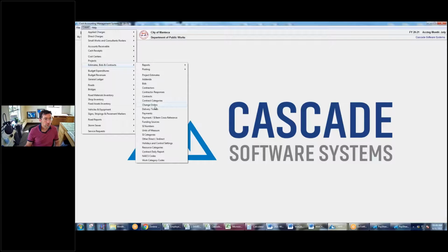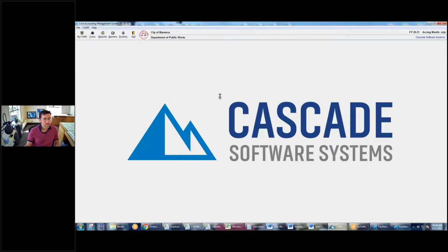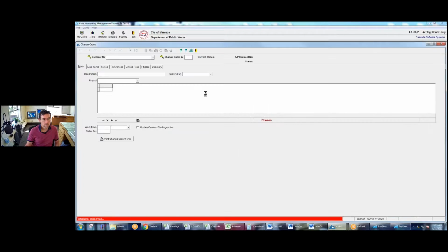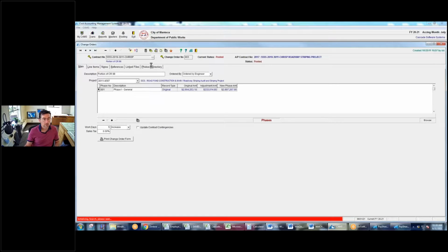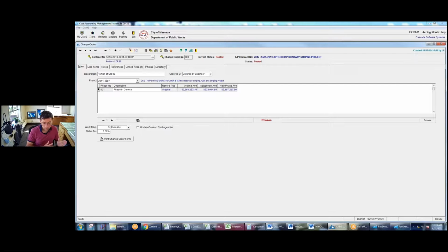So there are change orders that you can enter, because the contract is already posted and we don't want to just go changing it. You saw in those settings that you can overpay some line items, and you can set it to 0 and say you can't overpay them, but we don't mind, whatever your organizational rules are.